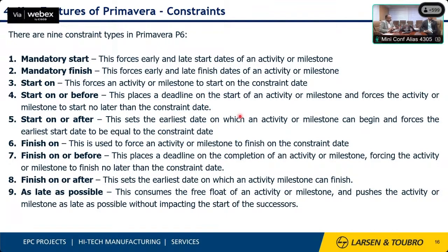Sir, this is basically the facility given to interlink the activities and their interdependencies. For example, if concrete has been poured, then before 14 days of curing, the next activity should not start.